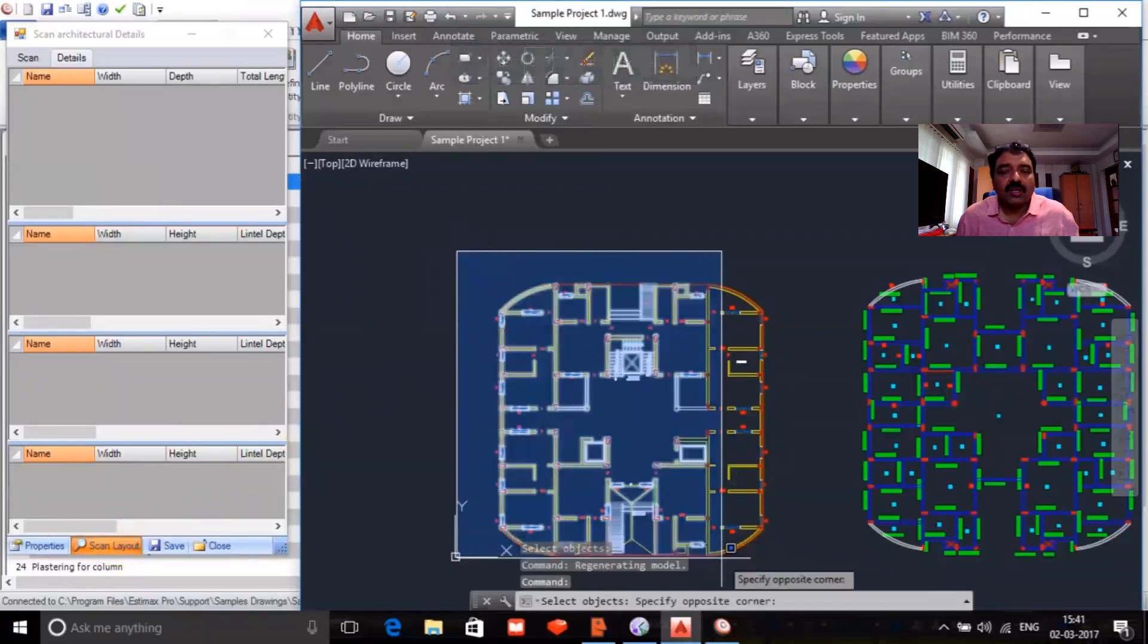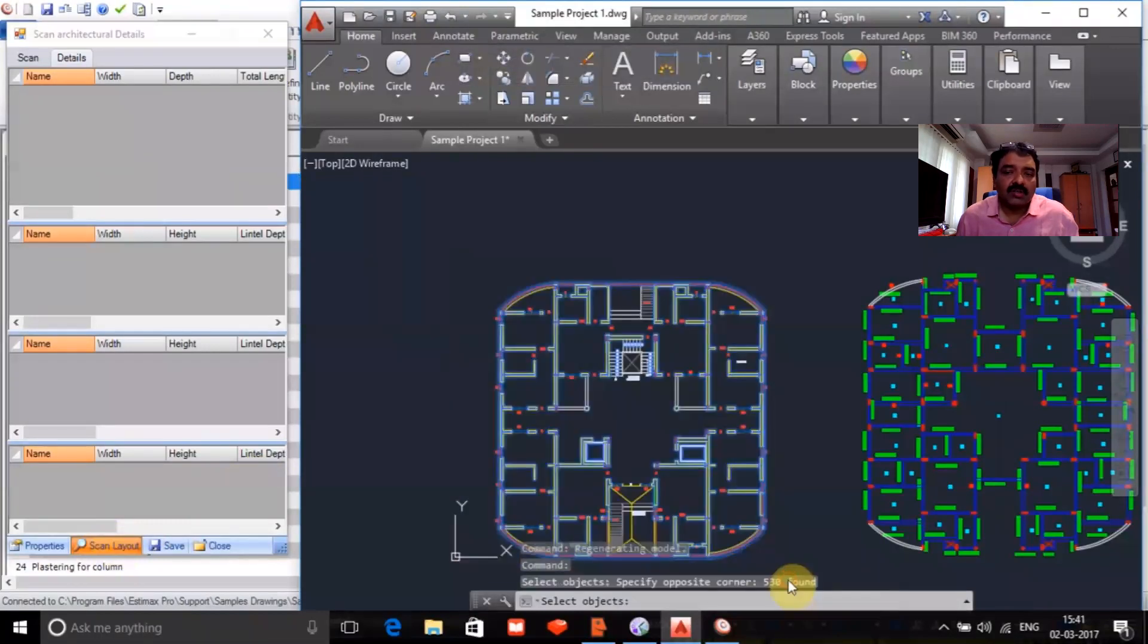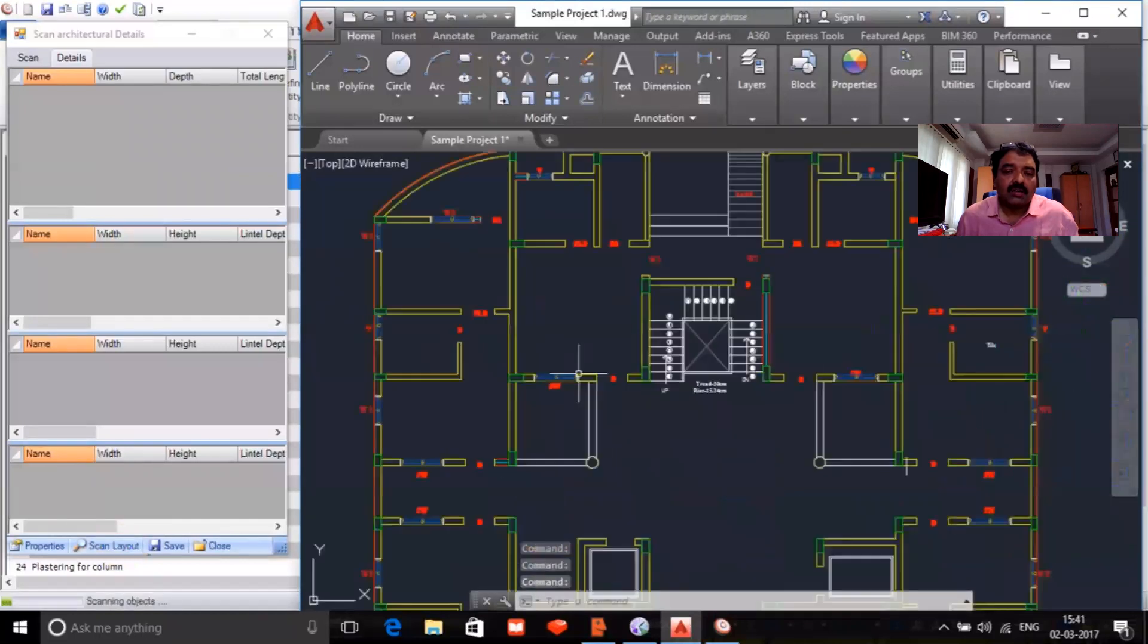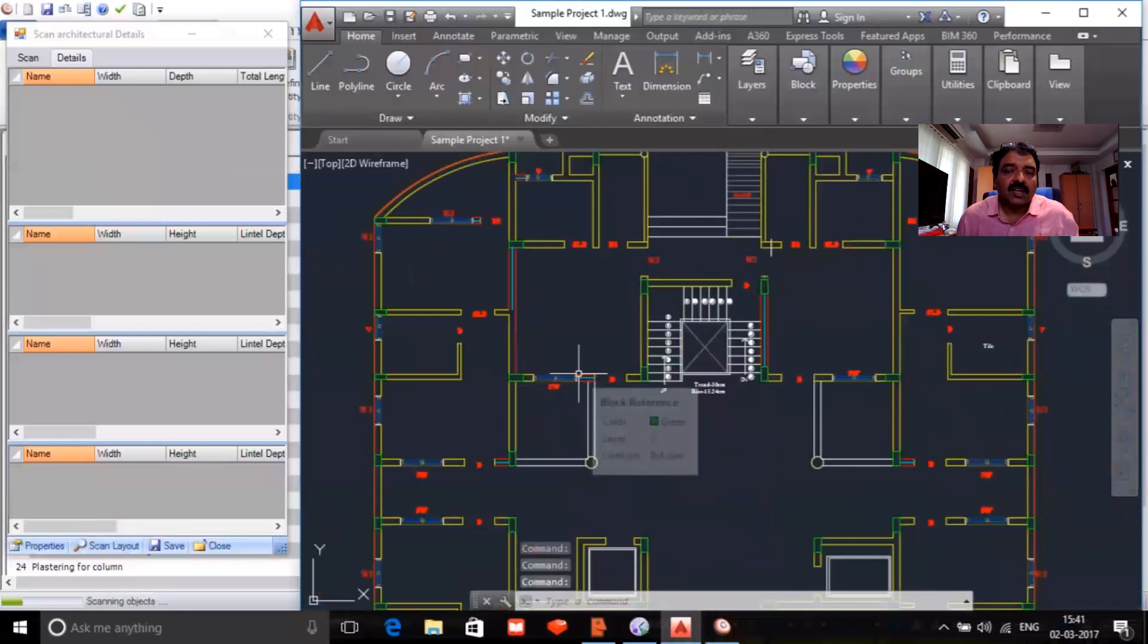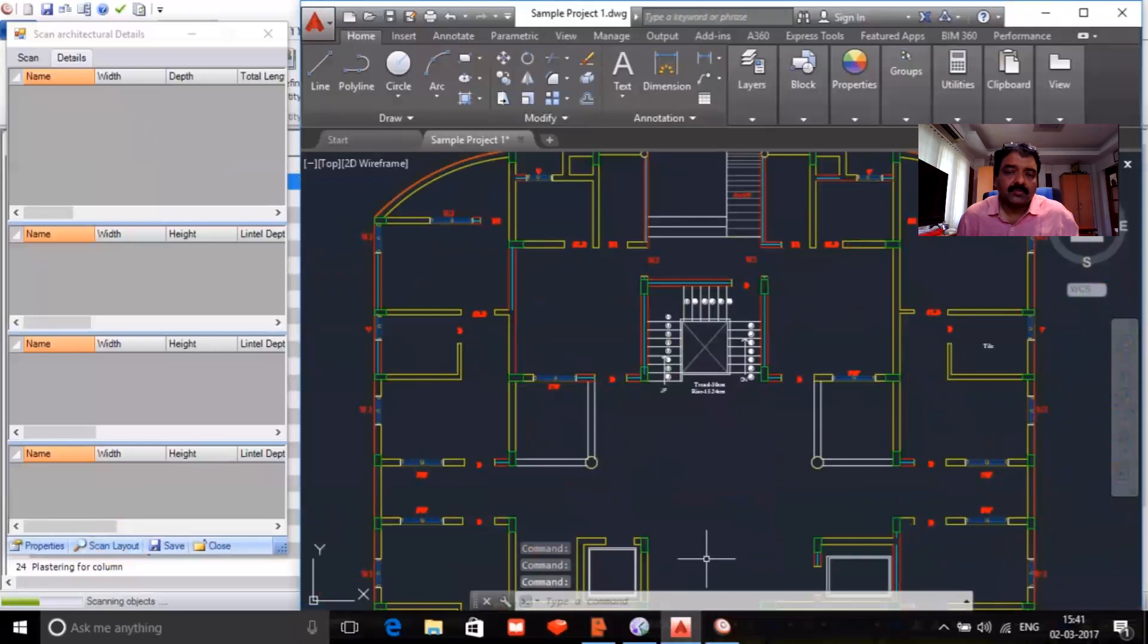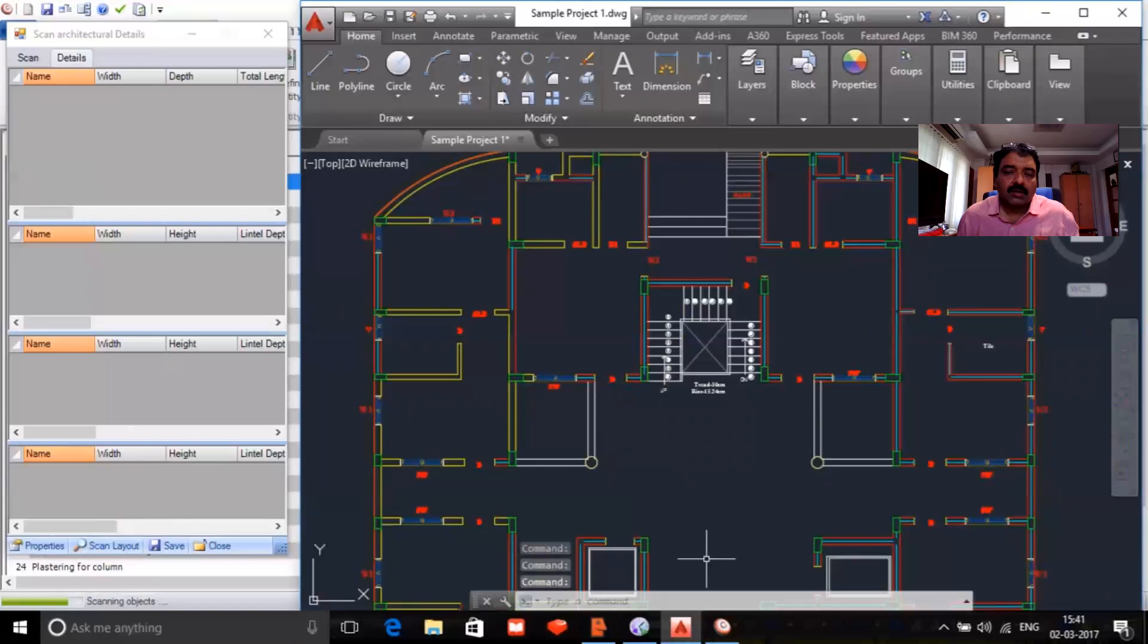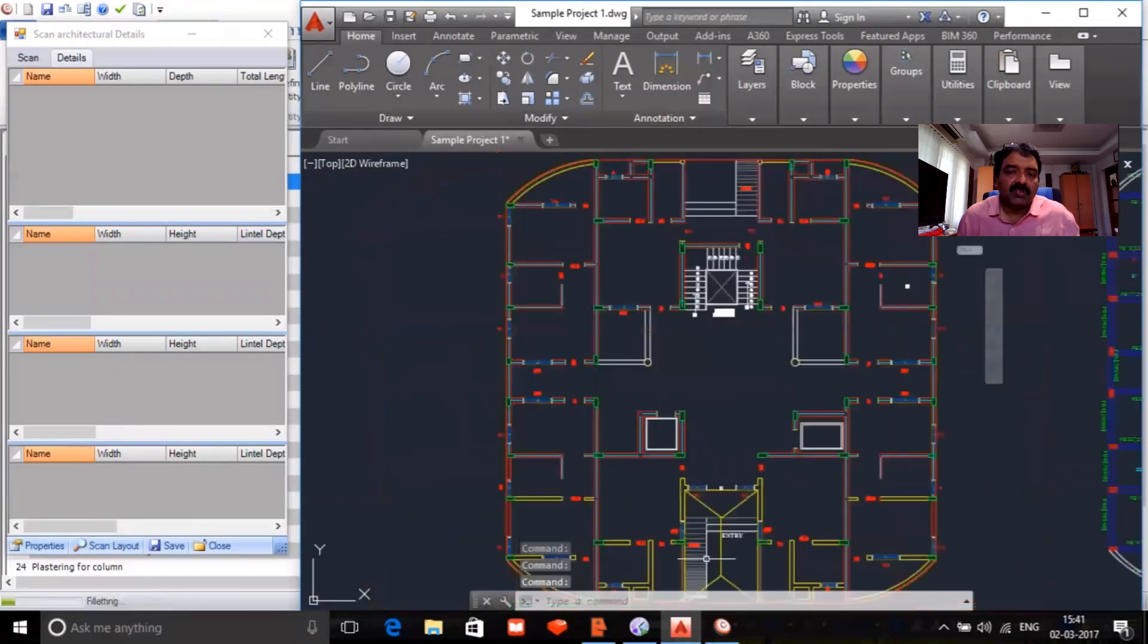What you need to do is only just scan the drawing, and it can create the centerlines automatically and create the estimation. You can see the centerlines being drawn by the system and using a centerline methodology. This will create the quantities automatically from an AutoCAD drawing.